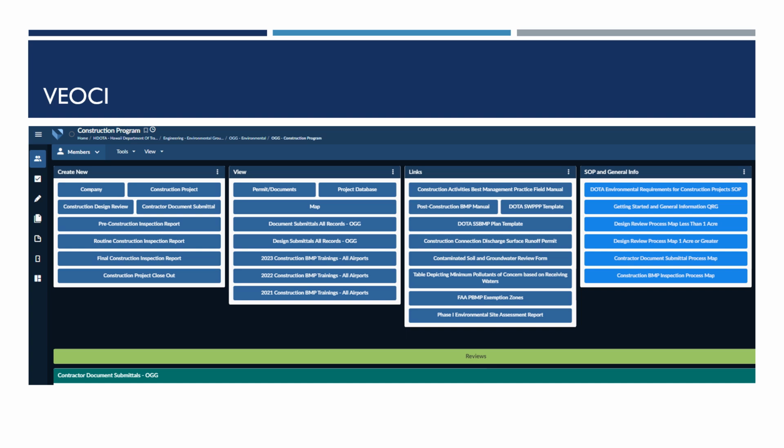The project workflow will comprise a process that will guide the designer through each step of the construction design review. After each submittal step, the AIR-EE design reviewer will review the submitted documents and provide comments. The designer will be notified when comments are available and can then revisit the workflow to upload revised submittals and respond to comments.